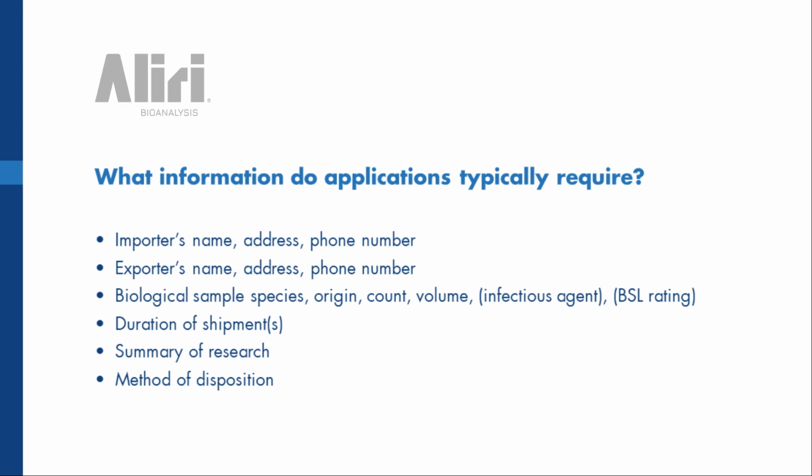And then, of course, the final method of disposition. So Pixton Labs works with a contract service that handles all of our biohazard waste. So these applications want to know, who is your contractor? Are they qualified to dispose of biohazard waste? And what will be the final outcome of the samples at the end of the project? And typically, they either get marked for destruction or they get transferred back to the importer's site.